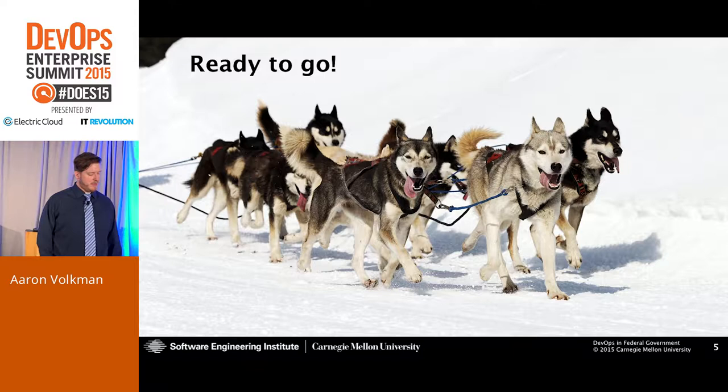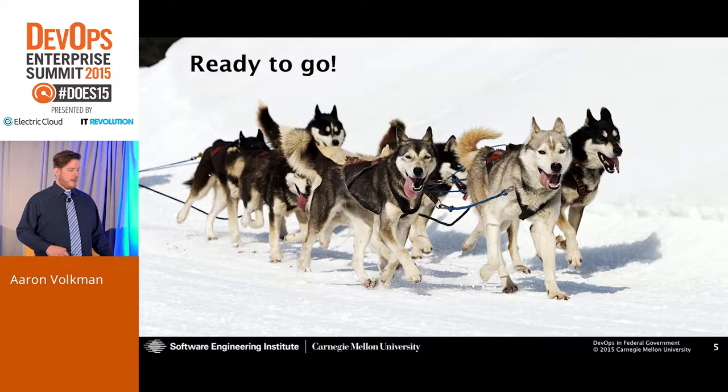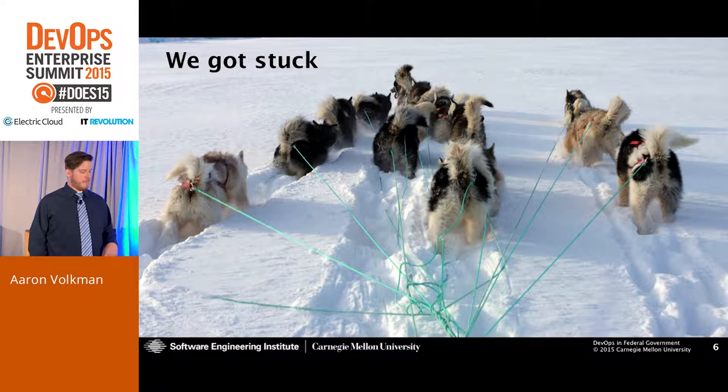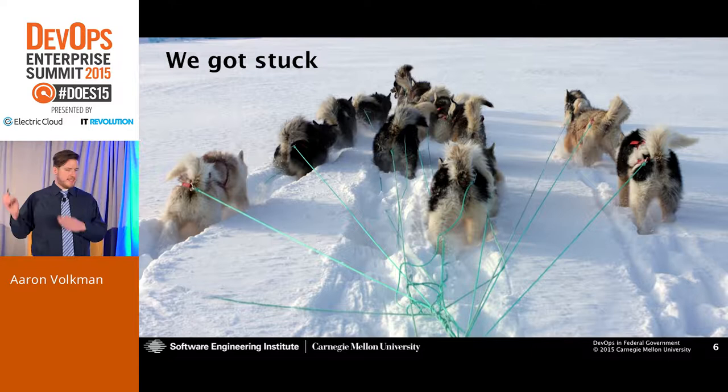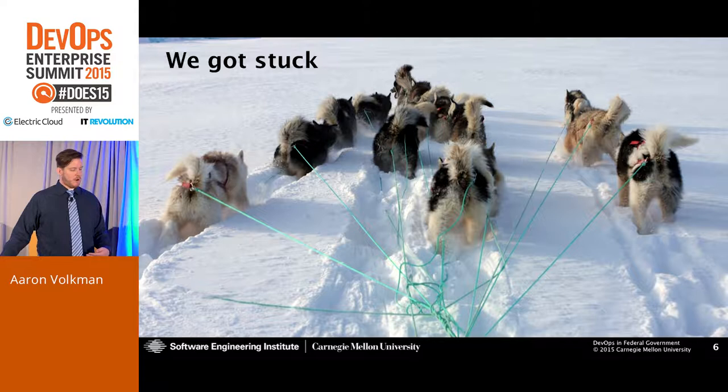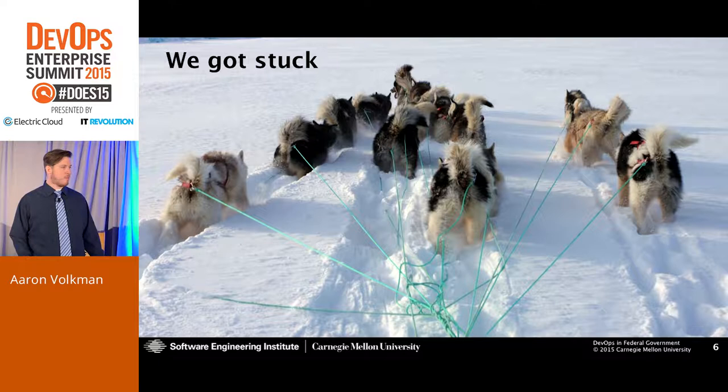Anyway, we went through 1 year of development. We're almost ready to deliver the product into production, and we got a little bit stuck in the snow. We ended up testing in a pseudo-production environment where the software had to run on the production network but be pointed to test servers, if you could imagine that. Production problems were found very, very late in the game, right before funding dried up for our project. And we learned whenever it was almost too late to save it, that the right stakeholders were not brought in at the right time, particularly ops and security.